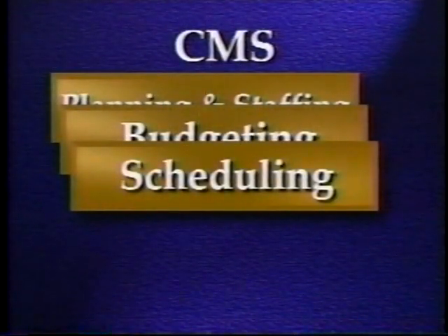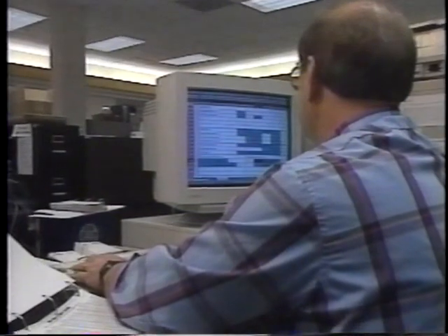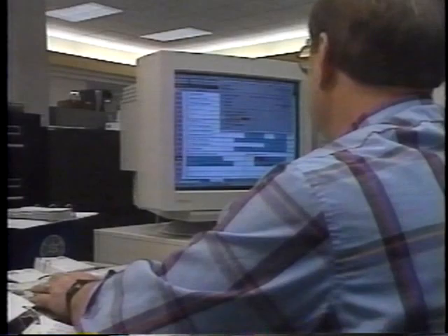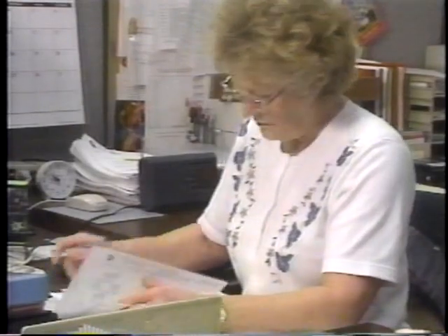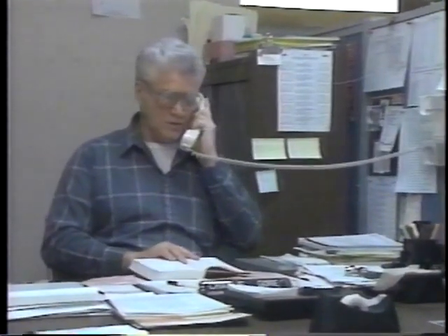The scheduling element provides for short-term, typically weekly, assessment of staffing needs to react to the contractor's plans, weather conditions, and employee availability for effective use of personnel. The process involves listing the work to be done, assigning personnel, comparing needs with available personnel, and advising districts or other areas of excesses or deficiencies in personnel levels.